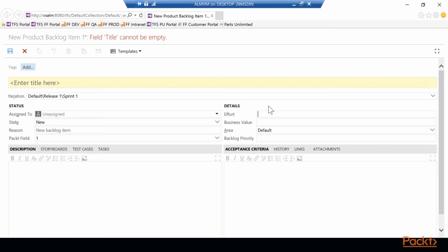So that's how you go about creating fields in work items and modify them. There's a lot of information on the internet for this, especially on Microsoft's developer network site, msdn.com. So feel free to go out there and experiment with these particular work items. But remember, I would export it first, make my changes, and then import it. And remember the field type, the string versus integer versus any other type. Once that type is set on the field, you can't rename the field or rename the type. You have to keep it as it is.